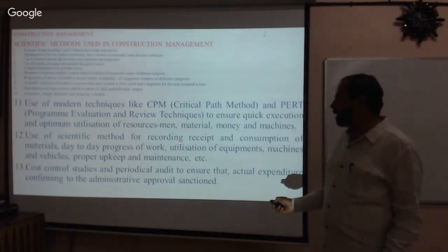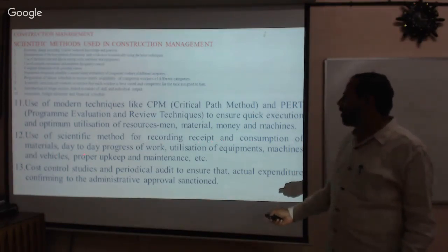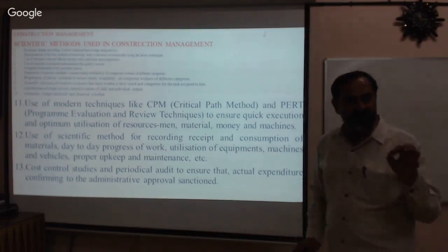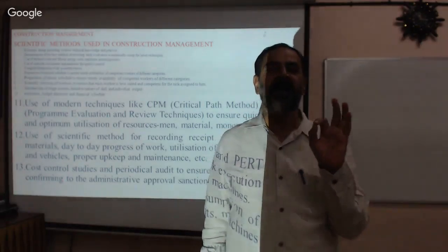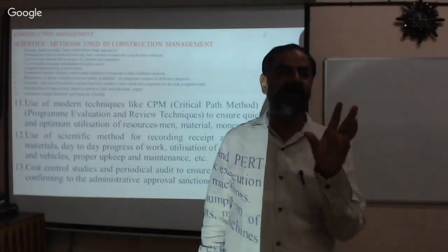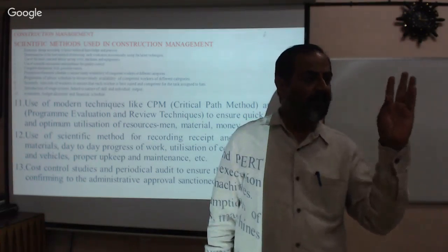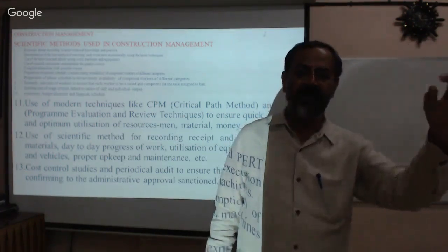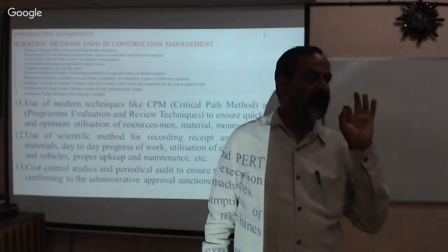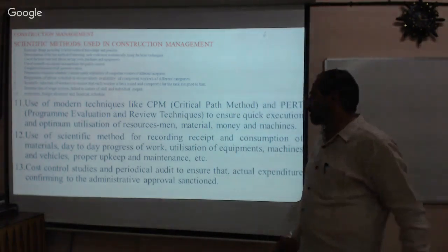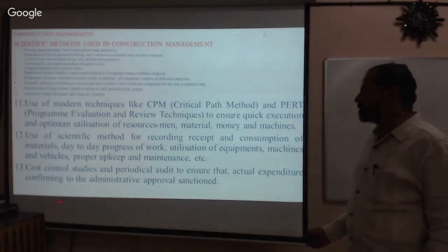Similarly, use of scientific method for recording receipt and consumption of materials, day-to-day progress of work, replenishment of equipment and machines. Now everything should be recorded in the office. Please remember, if you are a small project engineer, you take one notebook of 200 pages. Every day you need to record which material is received and how much is consumed. You keep one person to write this, isn't it? Therefore, you must have accountability for each and everything to become a good project manager.